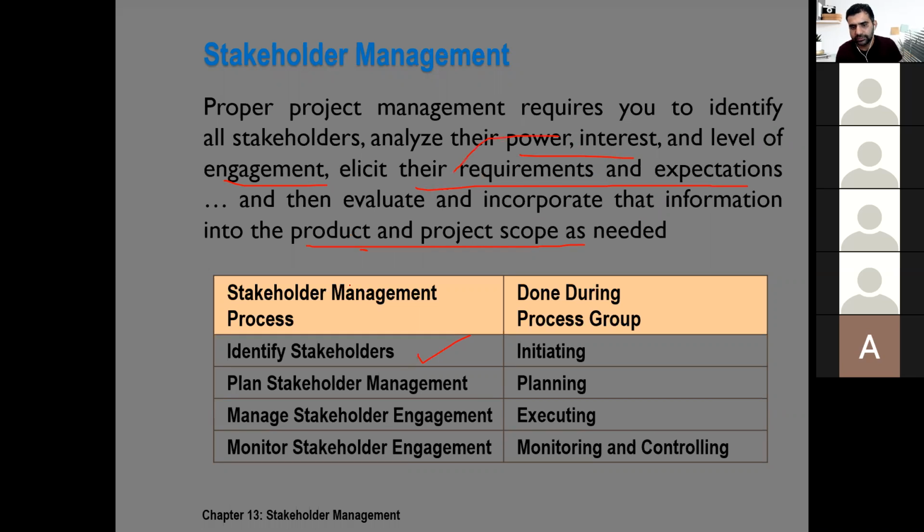Requirements will go to scope, whereas their expectations and engagement requirements will go into the stakeholder engagement plan or communications management plan.